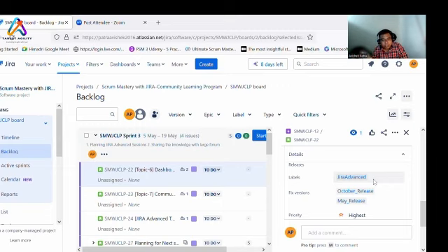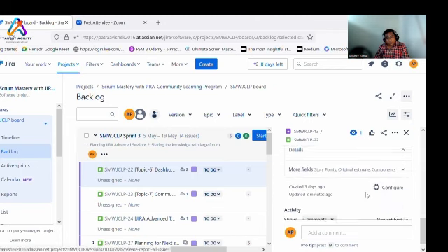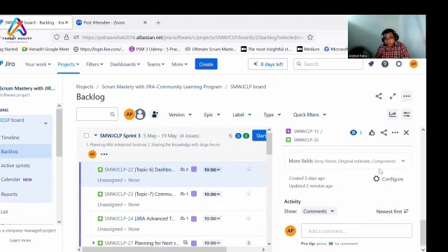So there is a high chance that, let's say for Jira Advanced, if you write GIRA with a small a, it will take it as a new label. Then the extraction of the data will be different. You're writing a JQL query where the A of Advanced is a capital A, but you're not getting all the Jira tickets. So we have to be mindful when we use labels. Fixed versions are a good option to tag the ticket.